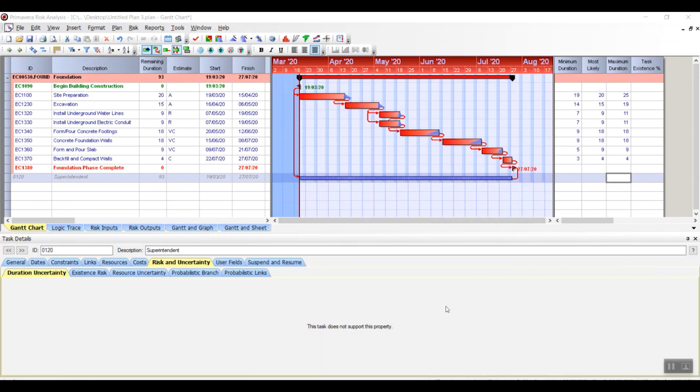If you look at the distribution triangles, let's look at this one, for instance. So this 18 days is considered very conservative. If you look at the distribution, you see that the chance during a simulation that this duration is going to be smaller than this 18 days, which is a very conservative estimate, is not that big. Most of the iterations will fall close to that 18 days. And this is how we adjust for estimating biases.